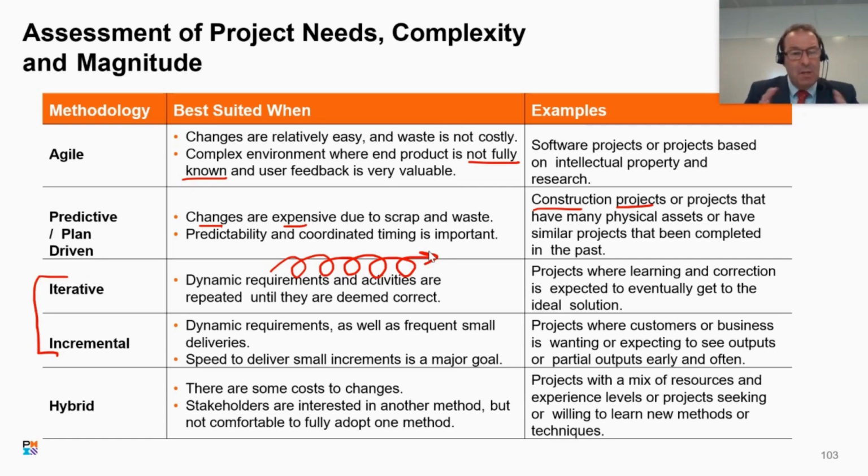Incremental is another dynamic approach. So what we're doing here is we're working literally from milestone to milestone to milestone. So think of this in a project development as we start off. Incremental delivery, let's say, of a building could be put your footings in. You then put the walls on top, then put the roof on top of that, then you kit it out inside, then you sell it. These are incremental deliverables. So we build it up bit by bit by bit by bit.